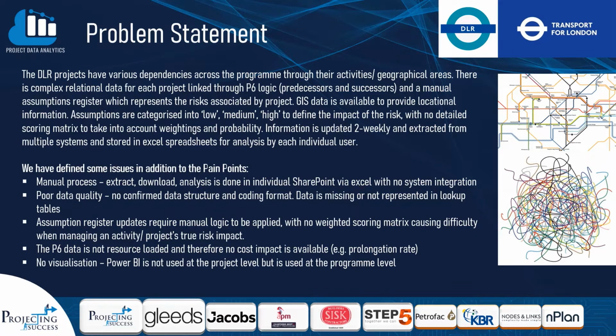We've identified gaps in the data, misalignments across files, and the need to apply additional logic for the risks to be correctly impacted. The P6 data is not resource loaded and no cost implications are available, and there's no system integration with Power BI, which means that data isn't represented visually, making it difficult to interpret.